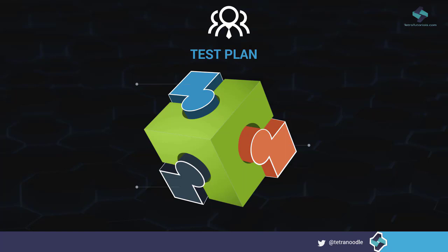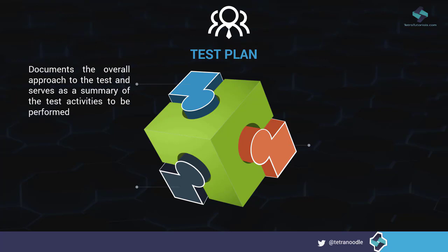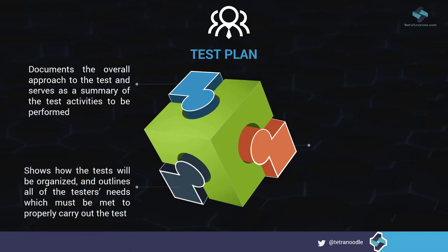Before starting the testing phase, a test plan has to be drafted. The test plan is a document that gives the overall structure to the testing activities of a software or IT project. Very similar to the overall project plan, the test plan also has a start and end date for the testing phase. It'll have details as to what types of testing will be carried out by the testing team, the sequence of testing tasks, and their relative priorities. The dependencies of each test case will also be called out.